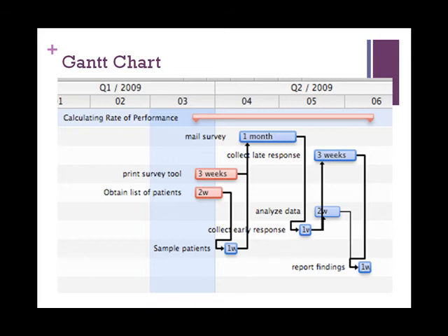To begin, I entered the activities for the project, the relevant predecessors, and the planned durations into Maryland to determine the planned start and end dates for the project. As can be seen in the Gantt chart, the project began on March 15, 2009, and the planned end day is June 5, 2009, giving it an overall planned duration of 3 months.